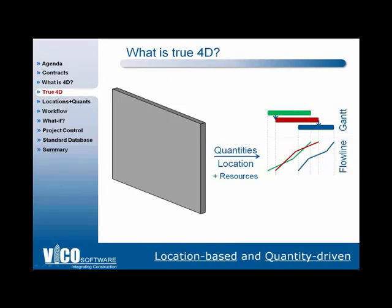Well, the true 4D, as we've seen, when we connect the BIM, we require information transfer. So going from the components, the elements in the building information model, the quantities and the locations along with an understanding of the resources required for the methods that we're using to create the building elements is driven into a location-based schedule.